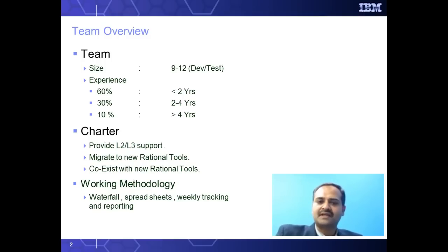Of this 6-month cycle, a major portion of the time would be spent on manual testing for each build that is getting created. Since these products are very stable, a lot of regression testing has to be done, and since it was all manual, we would spend considerable time in testing. For project tracking, we would do a weekly status meeting, where we would discuss the updates, the work done, and any blocking issues which are there with the team members.